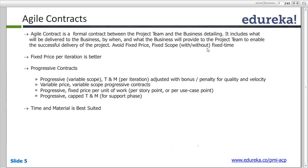So what we do is charge on the basis of story points. Once I know my stories and requirements, I give each requirement a story point defining its complexity. I then say any requirement with three story points would be charged for a certain amount. It's analogous to hours — after one or two iterations you can gauge that three story points generally takes five hours of effort. These are the typical agile contract types. The best approach is fixed price per iteration, and if using T&M, it should also be on an iteration basis.